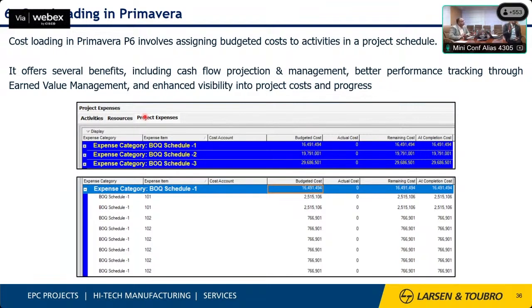In the Primavera universe, the invoice of the contractor is called cost because it is cost to the employer. However, the expenses part can also be assigned and calculated, but that has more to do with the unit cost of the contractor, not the cost to the authority. So these are two basic things. Usually the term used in Primavera is cost, but actually it means invoice, and we can develop an S curve in Primavera based on our scheduling.